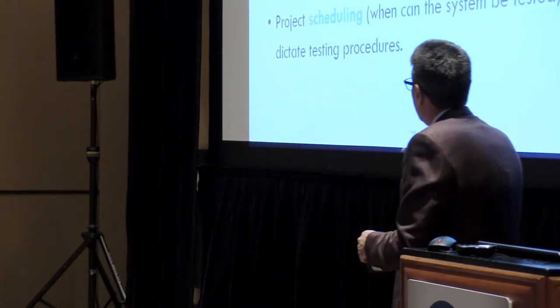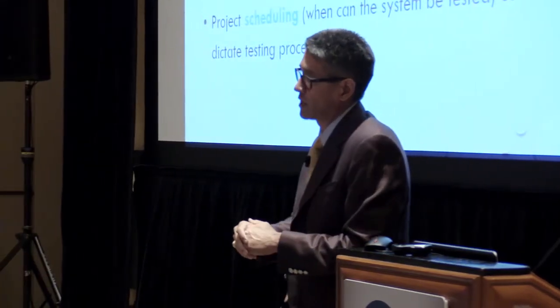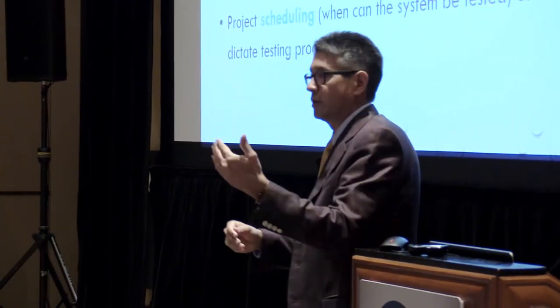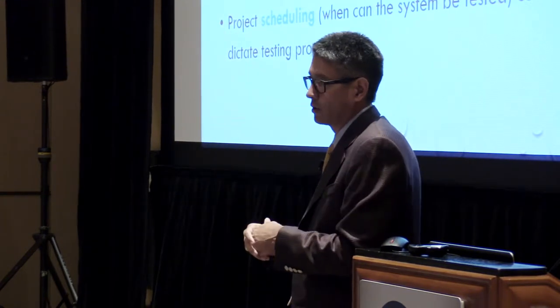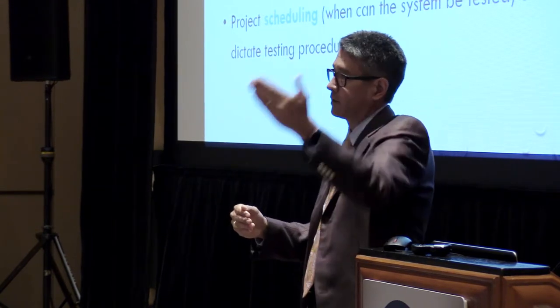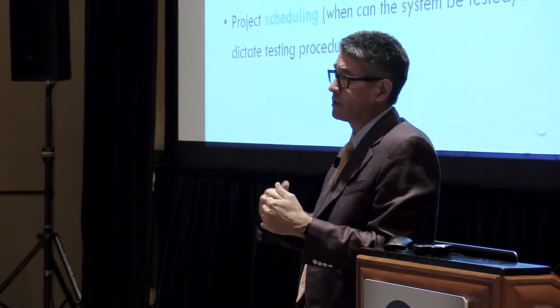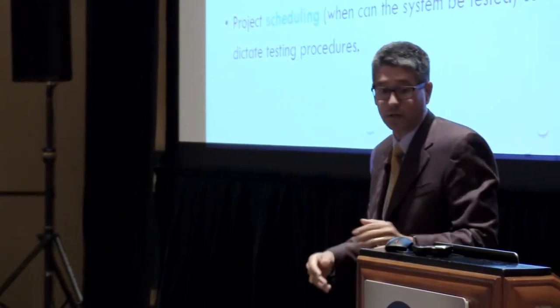So the other thing that always comes in is project scheduling. That always becomes a challenge of they want you in, they want you out. And if we can give you part of a system, can you start balancing that system partially and start working on that system now, work your way through the building. So scheduling could dictate how it's approached and how you look at that building, how you're going to do it if you have diversity in your water system.